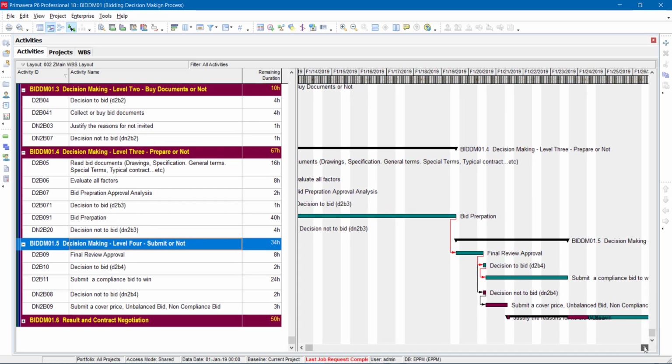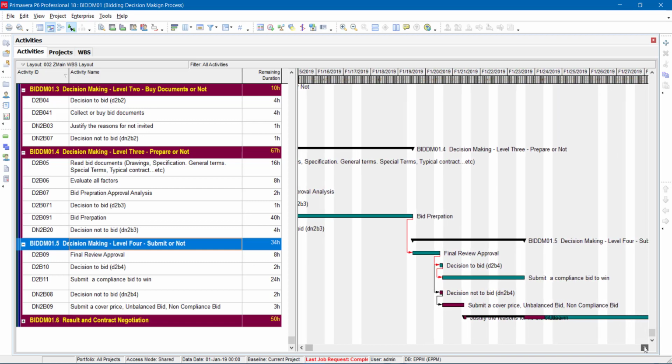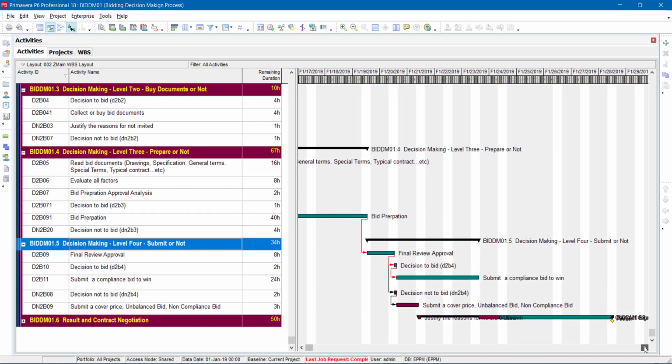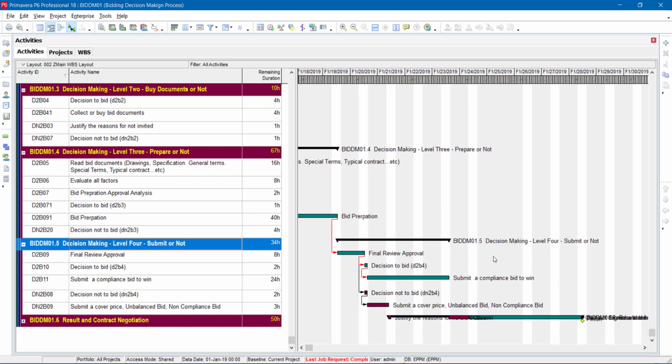Sometimes they are waiting for some financial confirmation, like the bid guarantee of 5% to be submitted, and they couldn't arrange these issues, for example, and they will not submit. It happened sometimes, and the research found that there are some cases where companies come to this stage; they finish the documents and are ready to submit, but they don't submit.